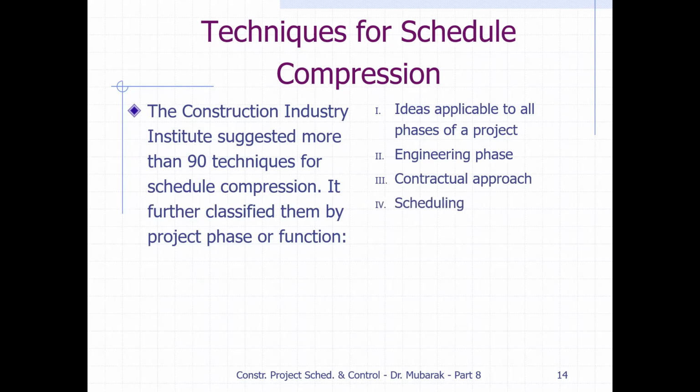So we should pay attention that we have good planning and scheduling, and then follow our plan to complete the project in a shorter time. We should have material management, so there is no shortage of material. If the materials are not available on site, it means labor will be sitting idle. So we should have good material management.